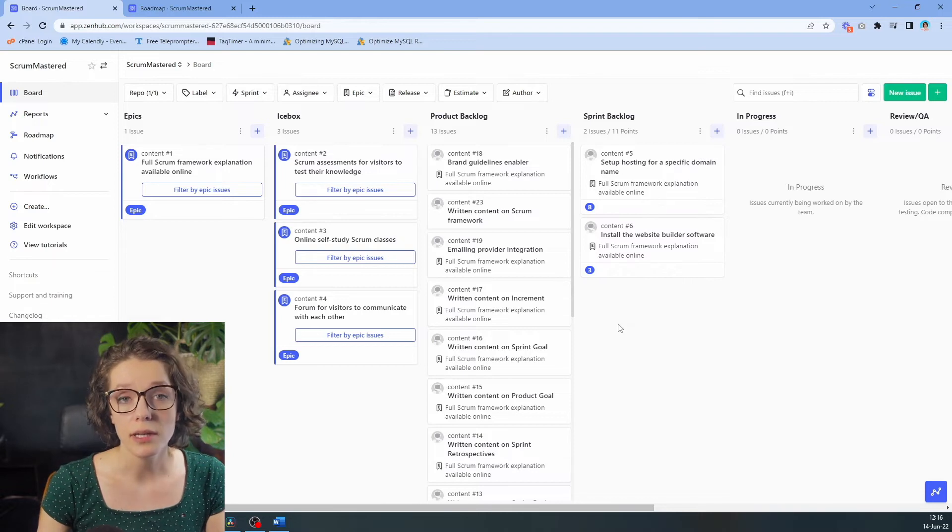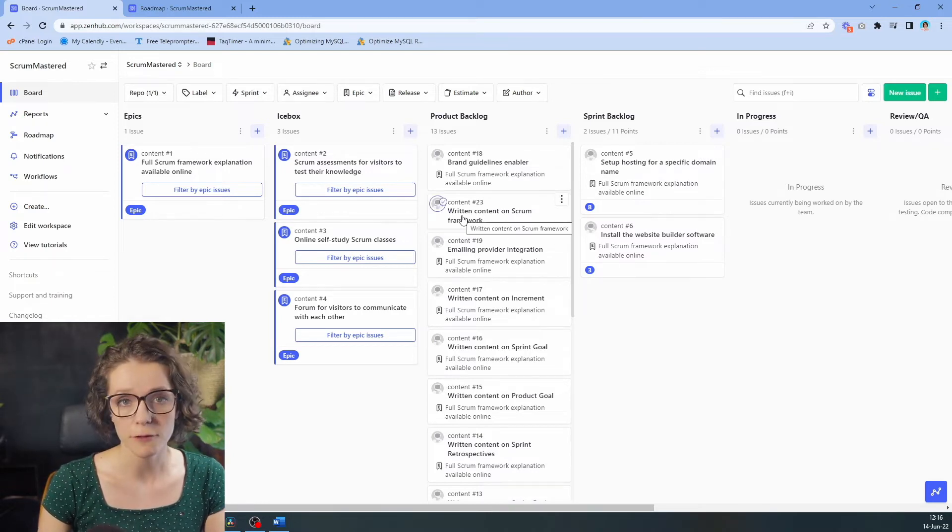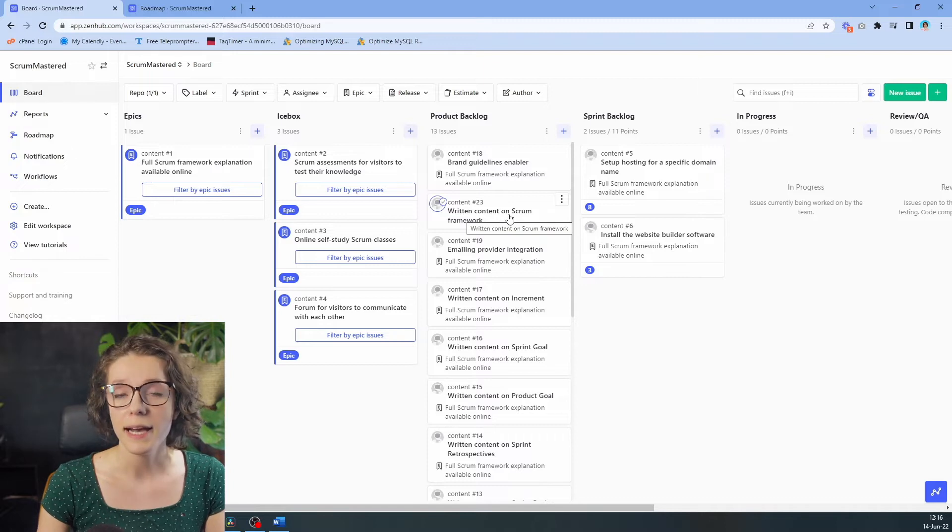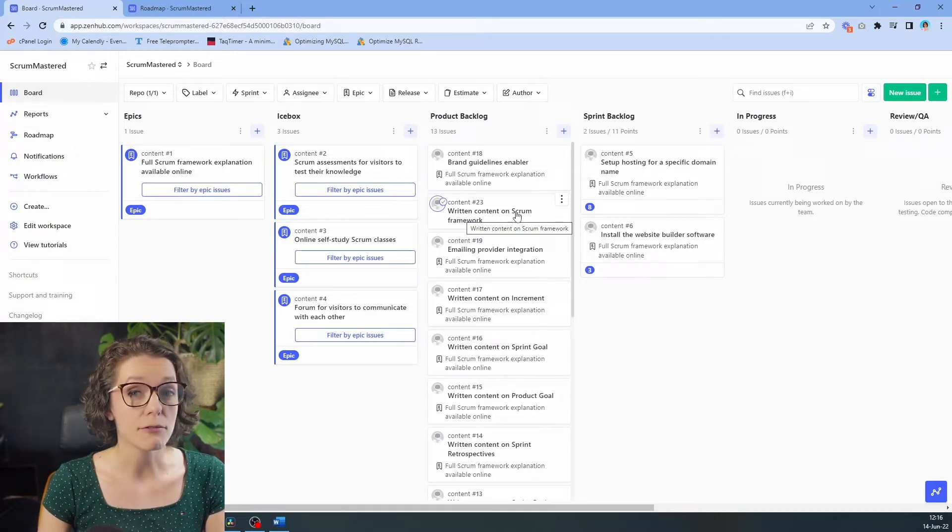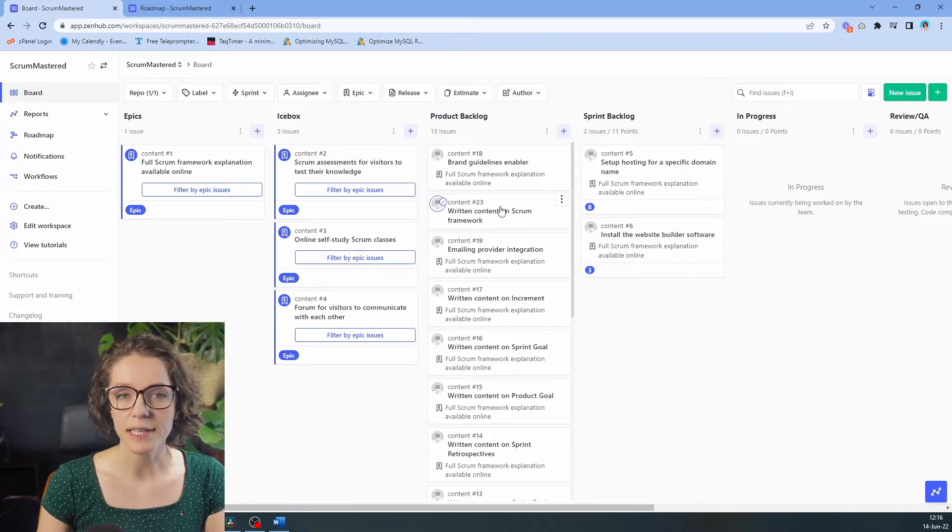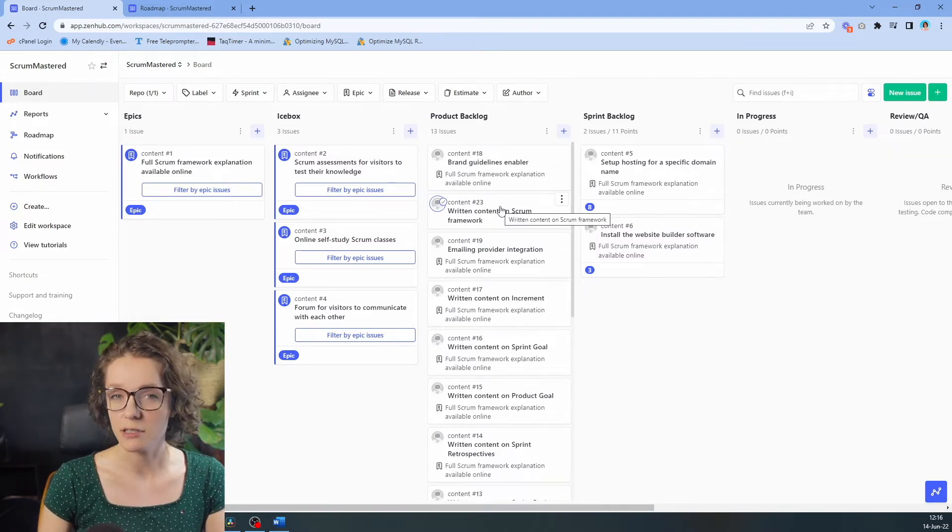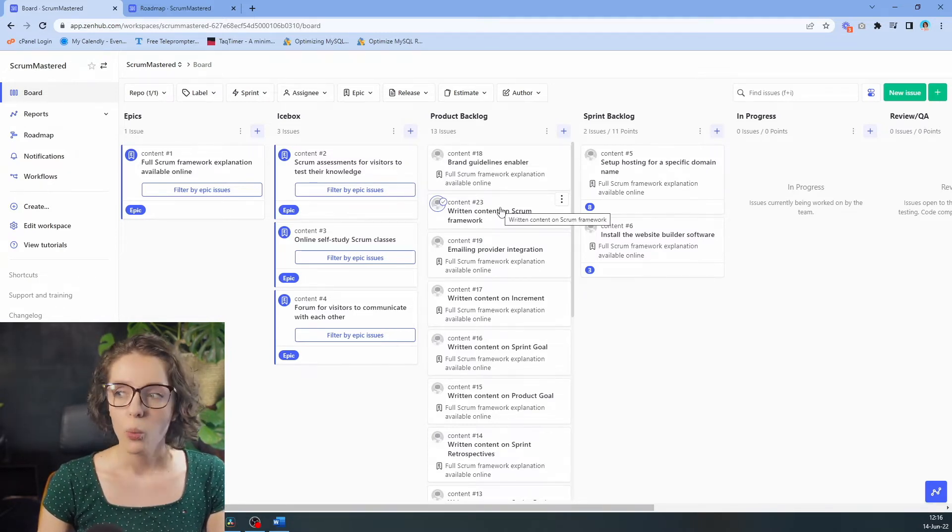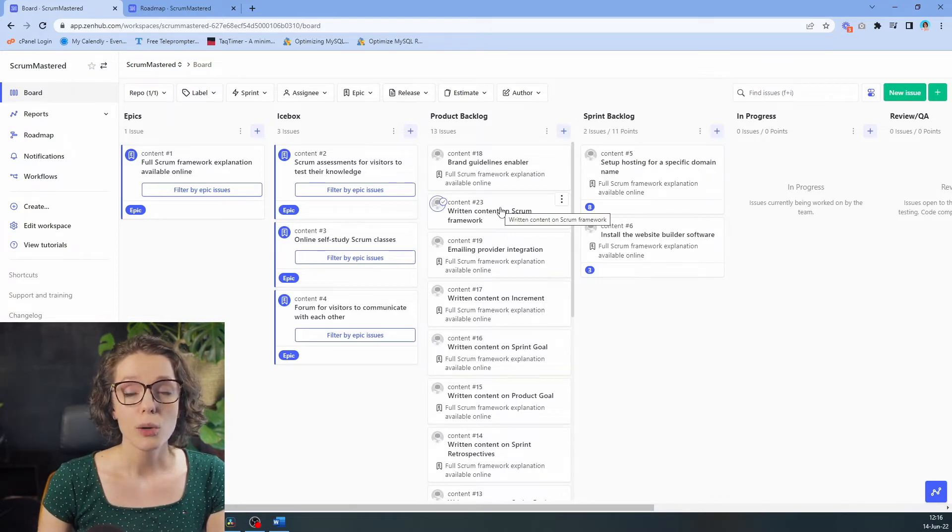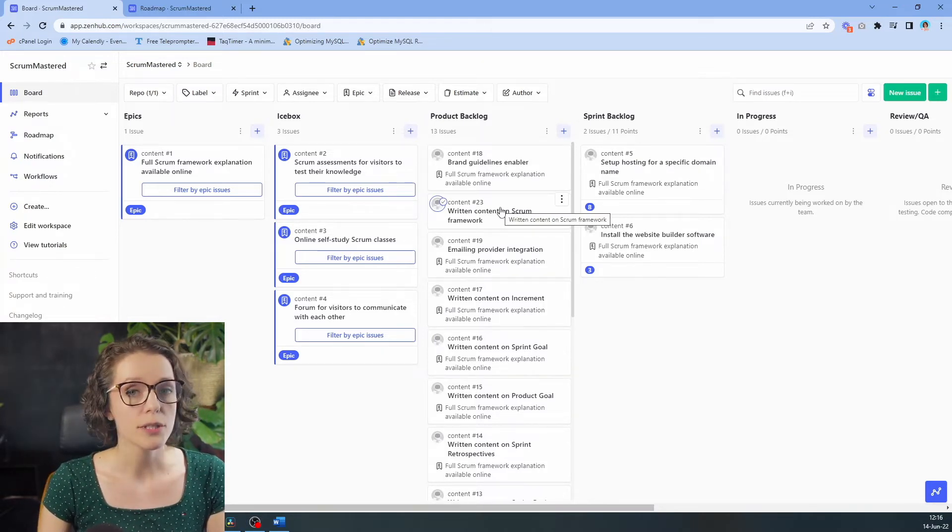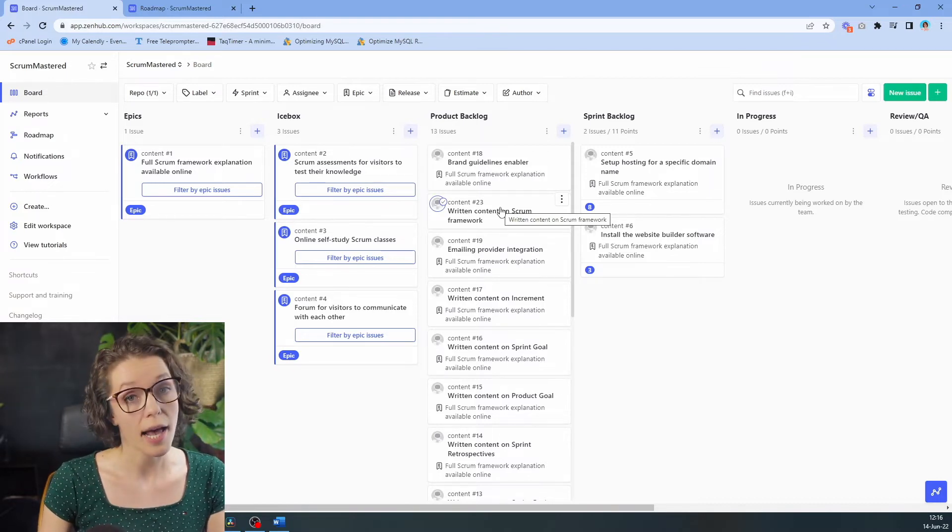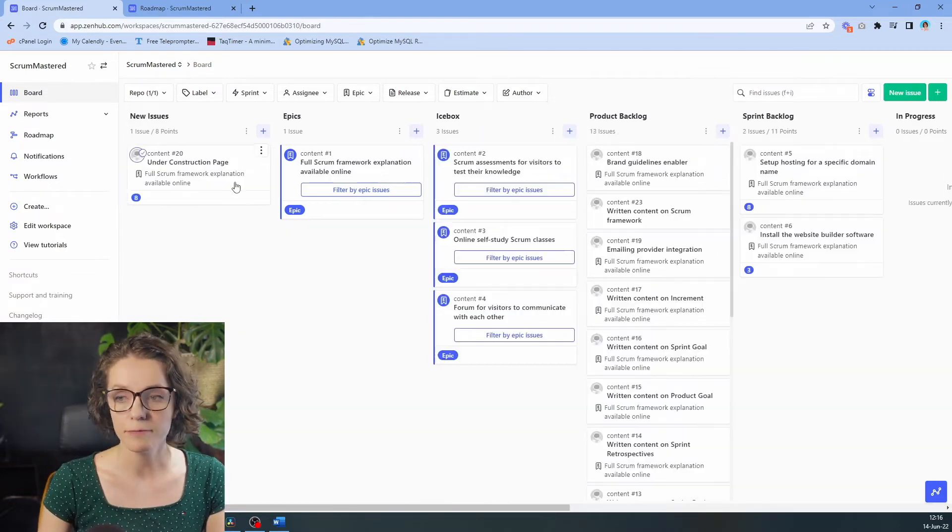Now, the team would love to create the very first page that will have all of the scrum framework explanation there. However, they realize that they might not have time for that, so instead they believe they should create an under construction page first. We don't have this item in our product backlog, so because we have uncovered it during the sprint planning, we can create it and add it into our epic and into our sprint.